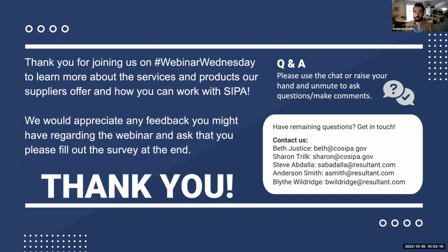And we'll try to jot down some of those key pain points with the existing solution in an initial discovery session, and then we'll do a follow-up session to start to transition from that focus on the current solution to, okay, let's forget that for the time being. Let's do a little bit more open-ended discovery, open-ended solutioning here, of not what are the issues with that current process or technology, because we've documented those, we'll come back to those, but what's the actual need? What's the background on the need? What business outcome are you trying to bring about from this? And focus a little bit more on the general problem understanding side of things, as far as what service that software is serving for the company or for the organization or for the agency.